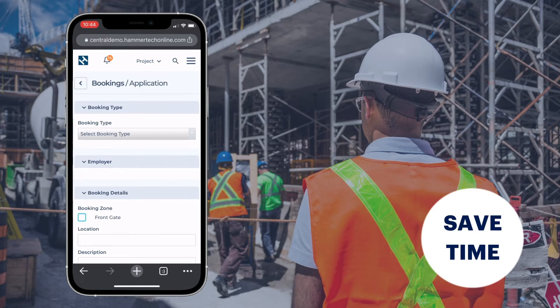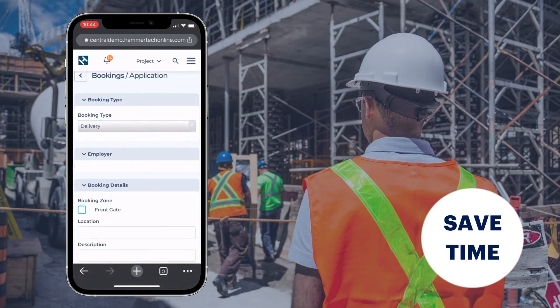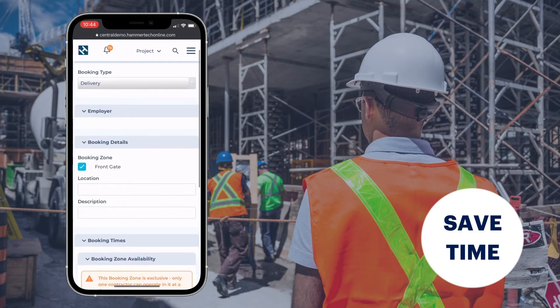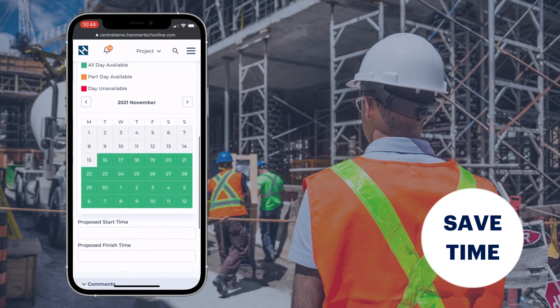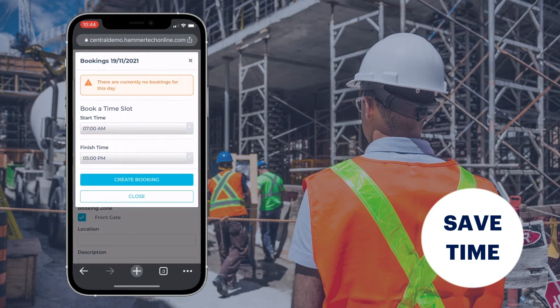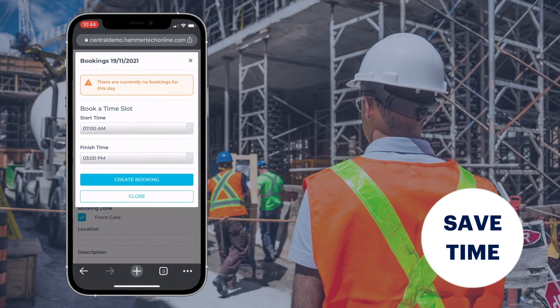Subcontractors apply for bookings providing details like material handling requirements. Align bookings with crane, hoist and labour requirements for safer materials handling.